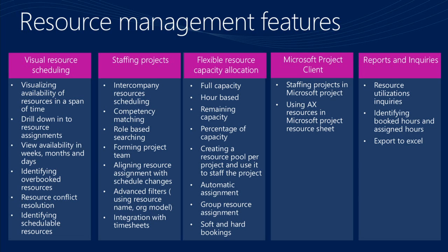Visual resource scheduling. We really built a panoramic view of resources and their availability. Resources have calendars. According to their calendars, you can calculate their availability. What's their capacity in a specific period of time? What is the work that they are assigned to? And basically, we are visualizing the resource availability. That I'm going to show you, and we're going to spend quite some time on that and interact with that UI. The second thing is drill down into resource assignment.